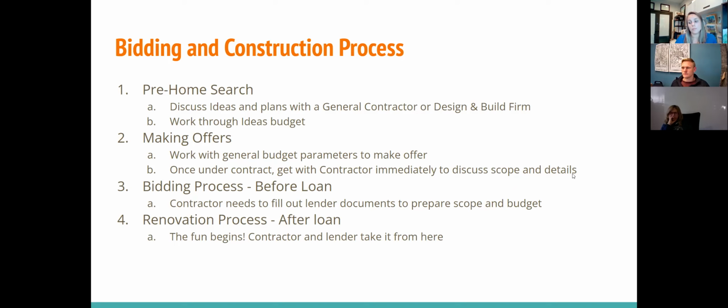So a home that was built prior to 1970, if it's a 1940s, 50s, 60s home, it's more likely that a lot of the plumbing, electrical, HVAC, if it's even there, and the wood and studs behind all the finishes will have to be replaced compared to a newer home built after the 1980s, 90s, or more recently. Those homes don't always have as much rotted wood and plumbing and electrical behind the walls, so the cost will be lower.